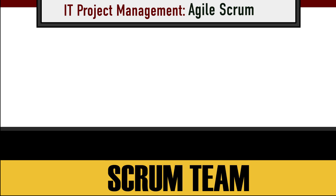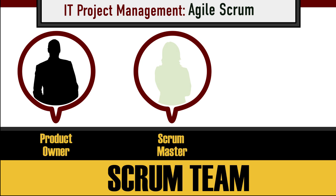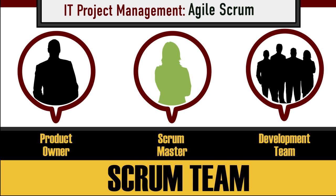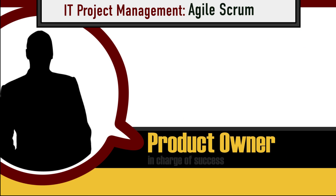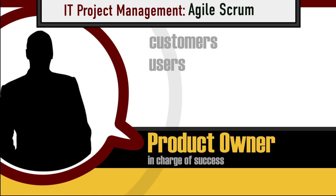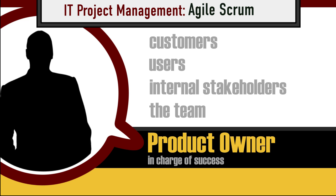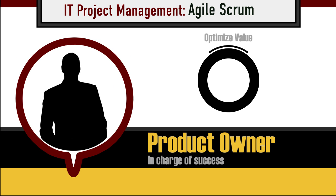A Scrum team is made of a Product Owner, a Scrum Master, and the Development Team. The Product Owner is in charge of the product's success. They talk to the customer, the users, any internal stakeholders, and the team to make sure the product is meeting the customer's needs. They also optimize the value of the team's work, identify backlogs, and prioritize the work.